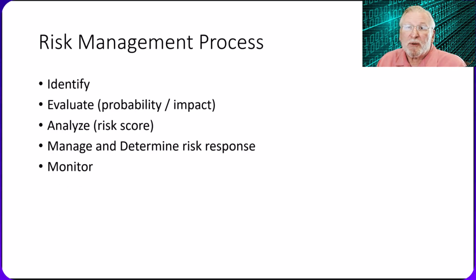In general, what the chapter in PMBOK on risk management covers are the 5 steps in creating a risk management plan. The first step is to identify as many of the risks as possible. For digital projects, Barateiro covers these pretty well and fairly comprehensively. Then, each risk should be evaluated and given a probability and an impact score. These are used to determine for each a risk score and a risk response, and an overall determination of project risk. Finally, a management plan is completed that shows how the project will be monitored and reevaluated over time. Let's go into a little more detail.